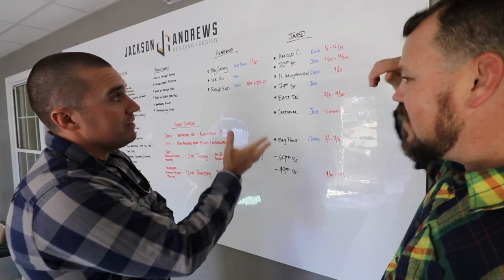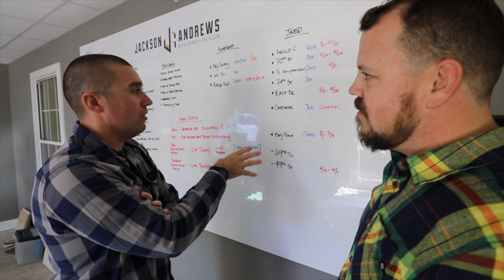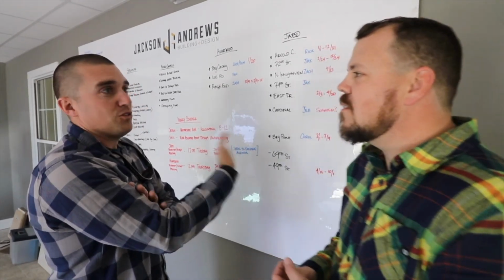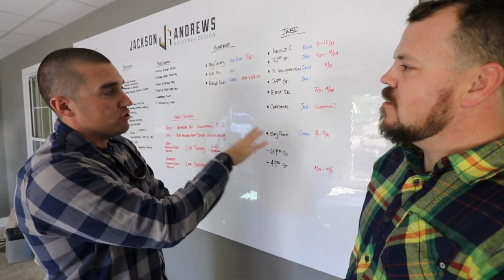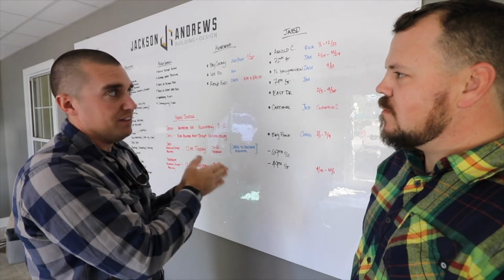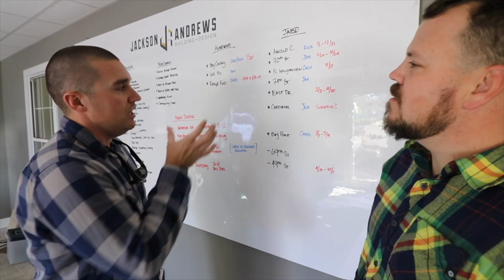And so, for example, some of these jobs right now have even changed as our clients' schedules sometimes change. Some have a dead set date: I've got to start and end by then for this to work. Other ones are kind of just fluid. They say, we have a son going back to college, we think on the 20th, so let's not start before that. And then they say, you know what, that's a horrible time, let's go ahead and start sooner. As we project for 2020, a lot of these things are locked in, and a lot of other ones, clients are flexible, and we say, we can get it done in this time frame if we start this date. If not, you might want to wait till the summer. So this one right here is probably going to get pushed off to the summer because they have a really small window they want to get completed in, which if we started now, it's not going to work.